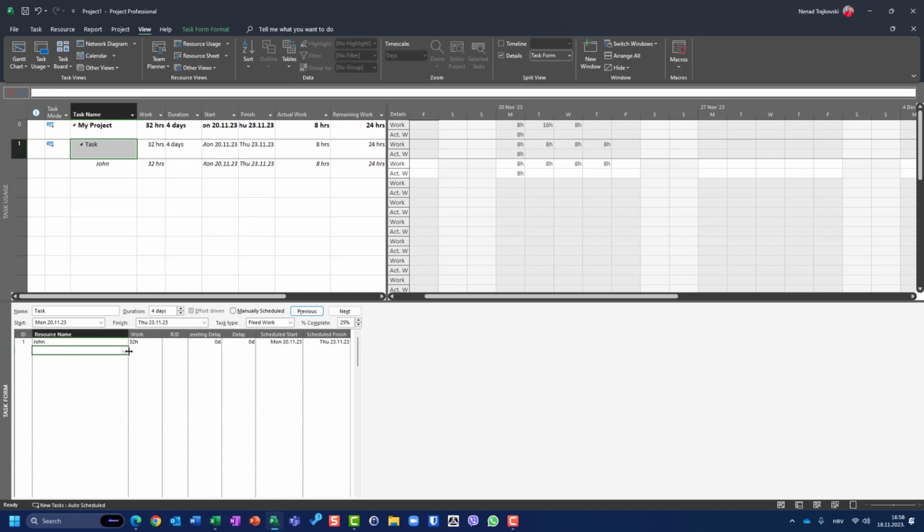What my blog reader wanted is to assign Mary and to say Mary should be finished on Wednesday. So he will put not the 23rd, Thursday, but Wednesday, which is the 22nd. And when we hit OK, you will see what I will get. I will get here that John is supposed to work 32 hours for 4 days, and Mary is going to work 12 hours per day to fulfill 24 hours.